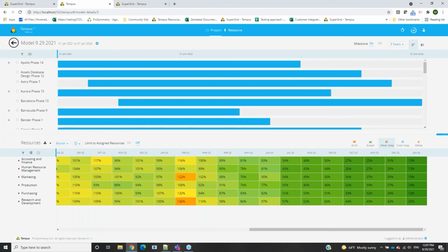So this is an option that I highly recommend using, especially if you're going through planning, you're proposing particular projects, and maybe you're unsure of when the projects can actually start or when you have that availability. It's a very quick and easy way for you to add those proposed projects in, get a nice high-level overview of your entire portfolio, and then use the opportunity map to start identifying potential start dates for this, just based off of the amount of work overall that you would need for this project.